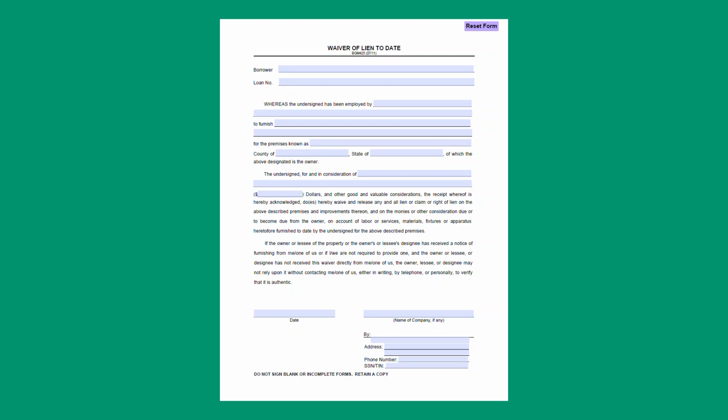When your subcontractor signs the appropriate lien waiver, they are effectively waiving their right to file a mechanics lien on the property for the amount listed on the form. These forms will be well kept in case there are any disputes in the future.